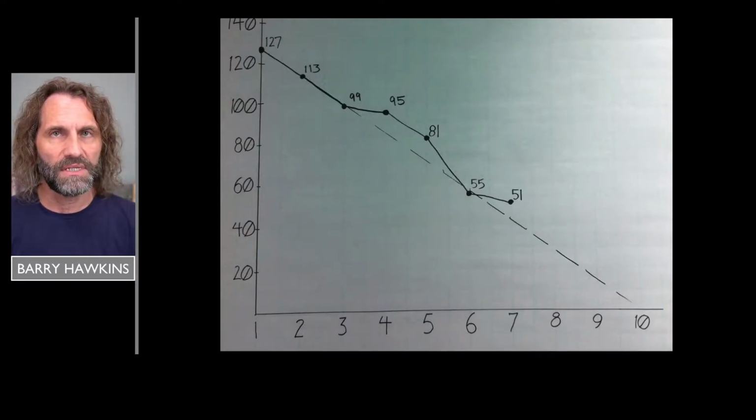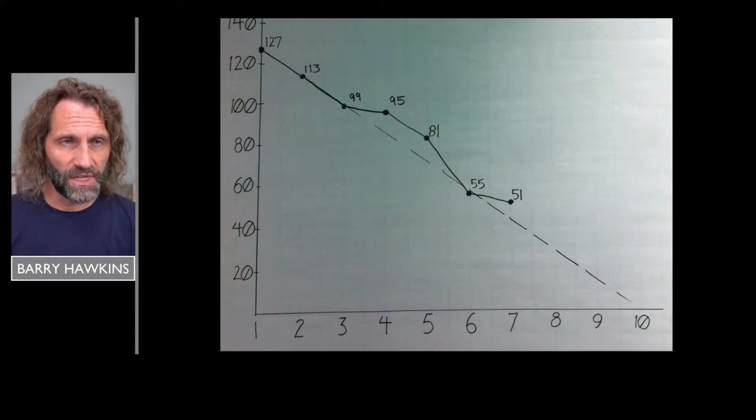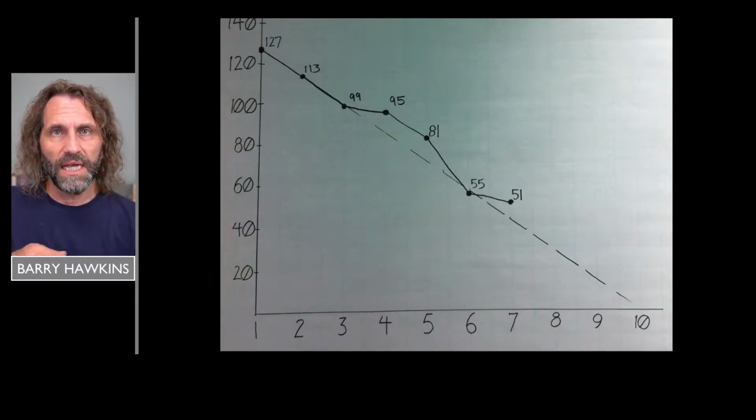And as you go along, it starts to look something like this. You can see here, this team is going along, and they started with 127 hours, total taskable hours. And then day over day, after their stand-up, they've updated it with the remaining. And you can see that they're largely trending right on target. The amount of variation above the line there, to me, that's picture perfect, idyllic, like nothing's going wrong there. But you can see that they're able to see how they're trending towards actually completing the work from a taskable hours perspective.